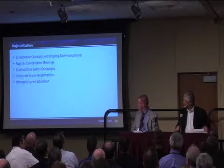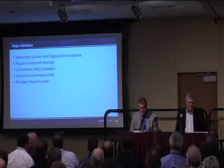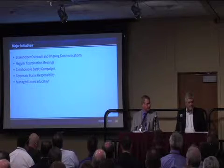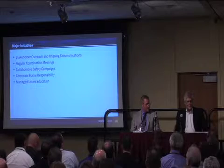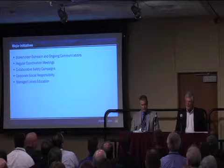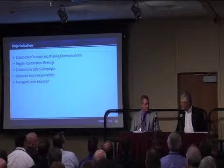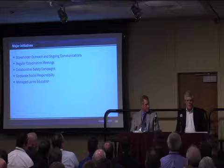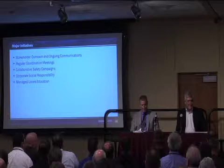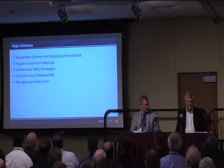I want to continue. Some of the major initiatives, Scott alluded to a few of them. We'll talk about a few more. One of the most important things on this project when we first started, because it was a design build, was that processes were going on simultaneously from day one. Right-of-way had already been acquired by TxDOT to a certain level, but we took over acquiring the last 299, I think, parcels. That was going on at the same time that utilities were being moved, at the same time that construction was already beginning on places where right-of-way had already been acquired. So it was a very fast-paced process.